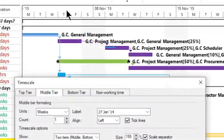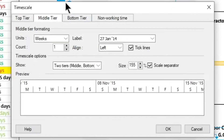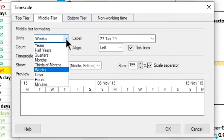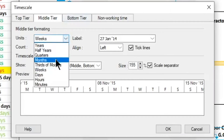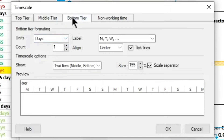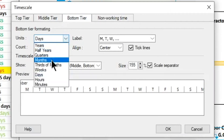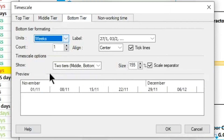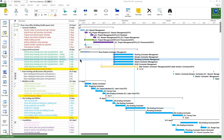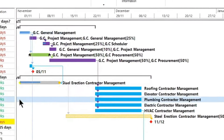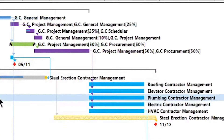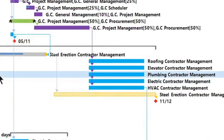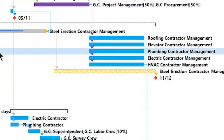Let's make the time scale a bit smaller in order to have a better fit on A3 paper size. Go back to the Gantt chart view and double-click on the time scale. We set the middle tier to months and the bottom tier to weeks, then click OK. Notice that now the task bars are smaller.